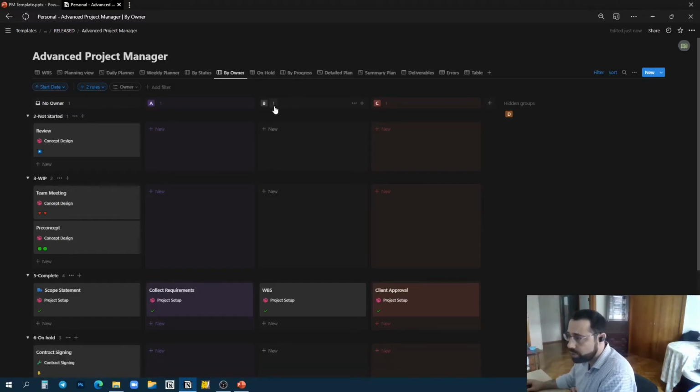A detailed plan, or before the detailed plan, I forgot to mention this for the owner. Over here, you have number one. This is the average SPI for each of these guys. Average SPI basically tells you how good or not good this guy is when it comes to performing his tasks. Is he ahead of schedule or behind schedule on average for his tasks?